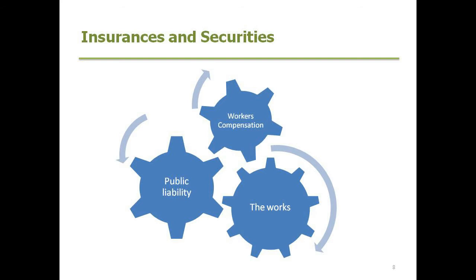It's also an important part of contract administration to ensure that all the insurances and securities are correct and in place. And that's important in case the project's damaged by fire or flooded and destroyed during the process of the construction. There's an obligation for the builder to reinstate that, and that would cause some serious financial risk, both to rebuild and also to the commercial interest of the client at the end of the project. So often these type of insurances are linked to builders' licenses, but it's important to ensure that they're in place, they're adequate amounts, and that they are current as well.